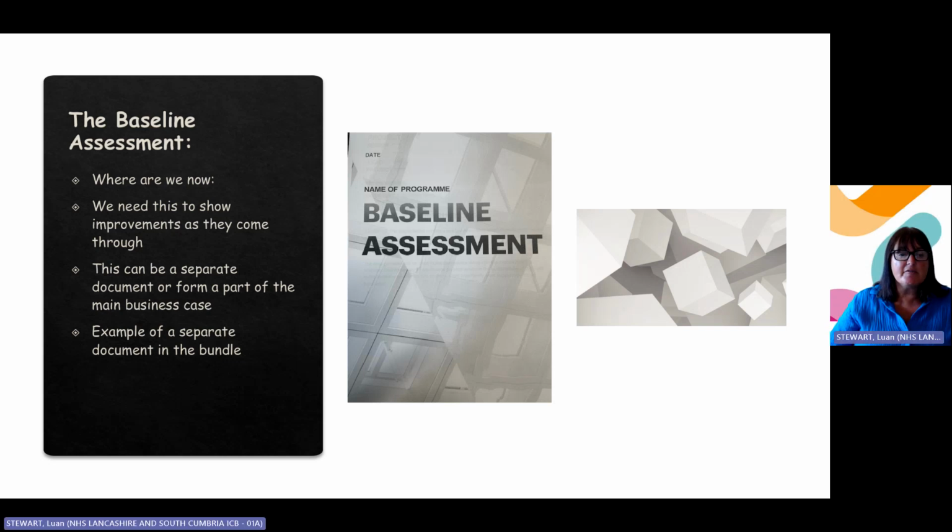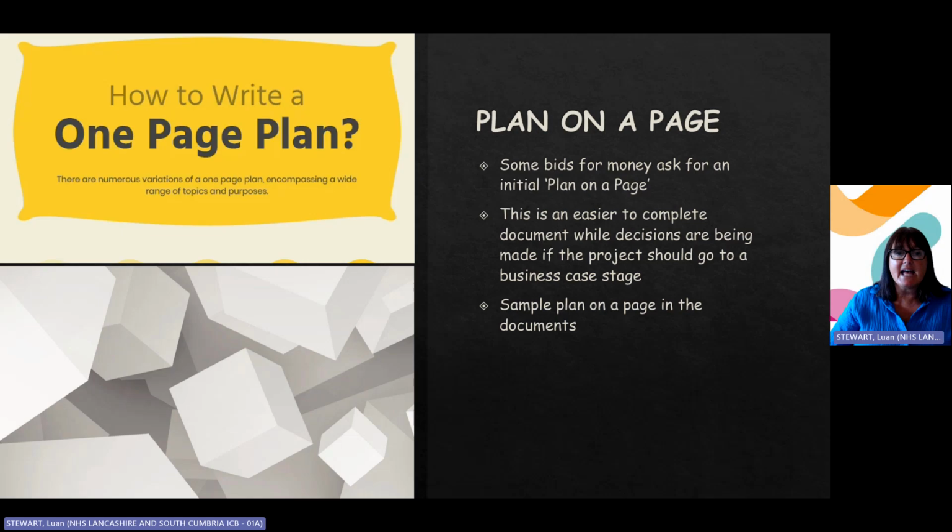Now, many times if you're going for funding for something, I know a few years ago, I applied for a funded project from NHS England on behalf of the PCN that I was covering at the time. And what they asked for was a plan on a page. The idea is that your plan on a page comes ahead of doing a business case. It's: don't spend all that time doing a huge business case. Let's do a plan on a page and see if the idea you've got is even worthwhile spending the time doing a business case.